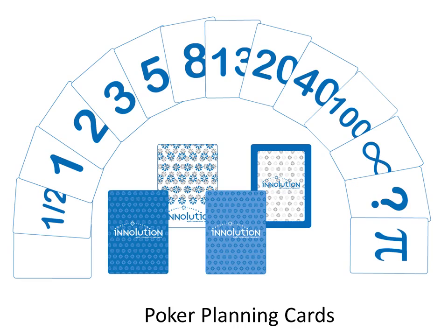So this one is just a typical example of a poker planning card. As you can see, most of the numbering there is using the Fibonacci series. So most of the time you don't really go about using the whole set of cards. Generally you use 1, 2, 3 up to probably 20 and no further. So generally most of the time that's what it's limited to. The others are just kept as too large or undefined. We'll go into the details of how to go about doing poker planning in another session.